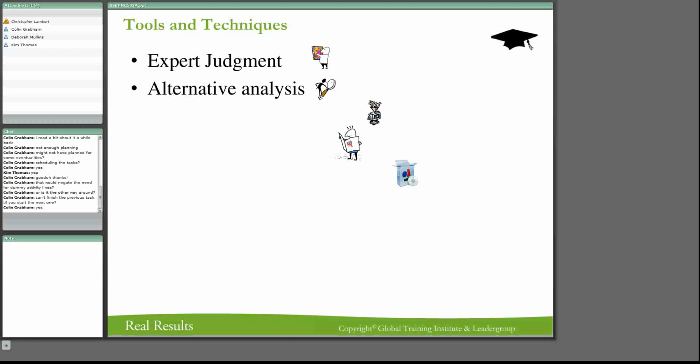All right, let's go on to the next one. Another tool would be published estimating data. I can only talk a little bit about this one in an area that I would actually know, and that's cables again. There are tables from industry that would allow us to do this. In other words, if I had to lay a particular fiber core from somewhere to somewhere else, there is published estimating data on that. And there's no reason why we can't use that kind of estimating data.